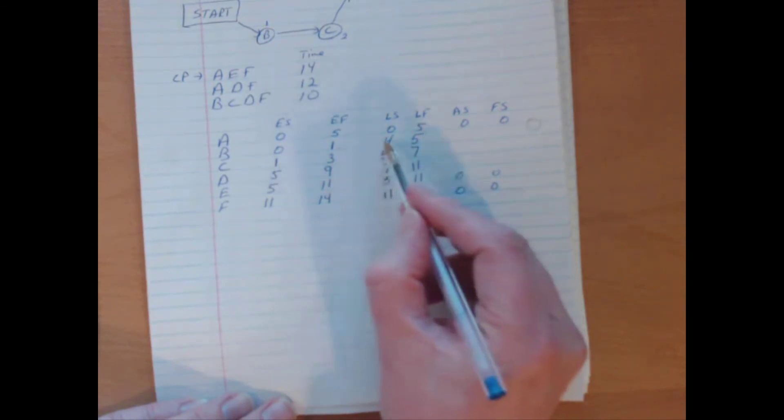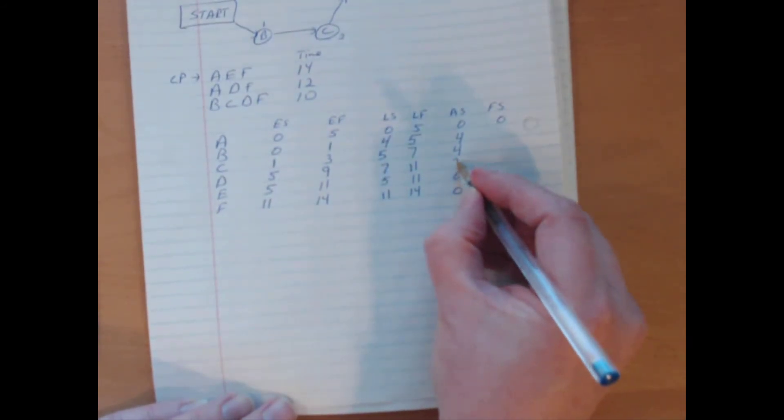Activity slack, if we remember, is the length of time where if you delay a certain activity, the maximum amount that you can delay a certain activity before the entire project is delayed. Typically, mathematically, we see it as the difference between the start times, latest start minus earliest start, or the difference between the finish times, earliest finish minus latest finish. So we can either go 5 minus 1, 4 minus 0. Either way, we get a 4. Same story with C. We can go 5 minus 1 or 7 minus 3. Either way, we get a 4. And D, 11 minus 9 or 7 minus 5. Either way, we get a 2.